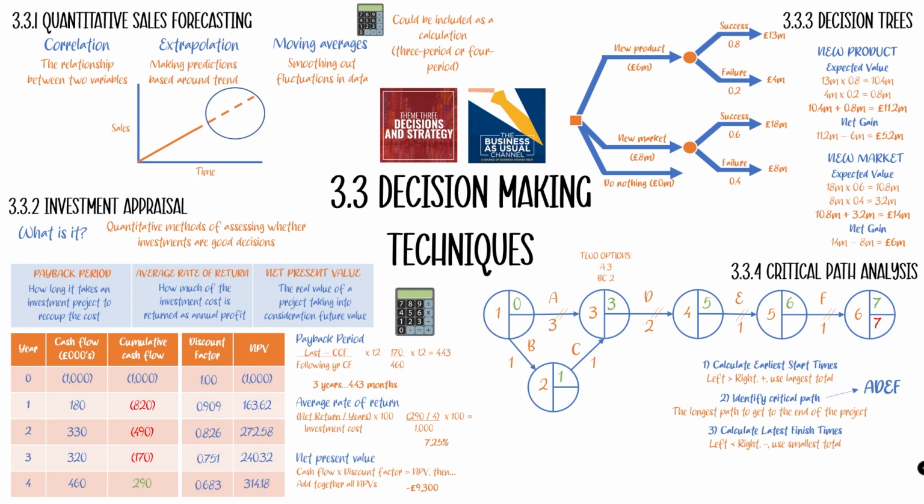So drop the 7. You see this in red to make it easy. 7 minus 1 is 6. 6 minus 1 is 5. 5 minus 2 is 3. And then here, to get to 0, we've got 2 paths going backwards. So we're going to do 3 minus 1 is 2. And then we've got 2 options into getting into node 1. We've got 3 minus 3 is 0. 2 minus 1 is 1. Remember, we're going with the smallest node total, so we're going to go with 0.